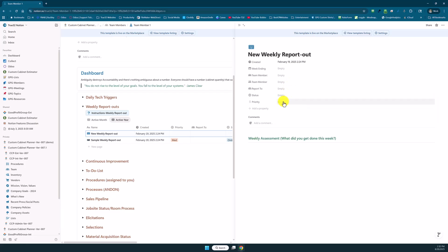And then to prioritize that. Now, some things you could be getting ready to go off track and your only job is to get the spider webs off the ceiling, but you've only been given a week to do it and you don't think you're going to be able to finish it in the week. Well, that's not a high priority. That's a low priority. So that gives your boss the idea of saying, okay, this guy is doing some landscaping or he's cleaning something and it's not something that is critical. It's not going to make it in the time frame we gave them, so it is going to go off track, but it's not a big deal. But if you're the finish guy and you're behind and you're not going to make your deadline and the whole job is going to be late because of it, we would want to set that at high. And you could have as many fields as you want in here to do that.